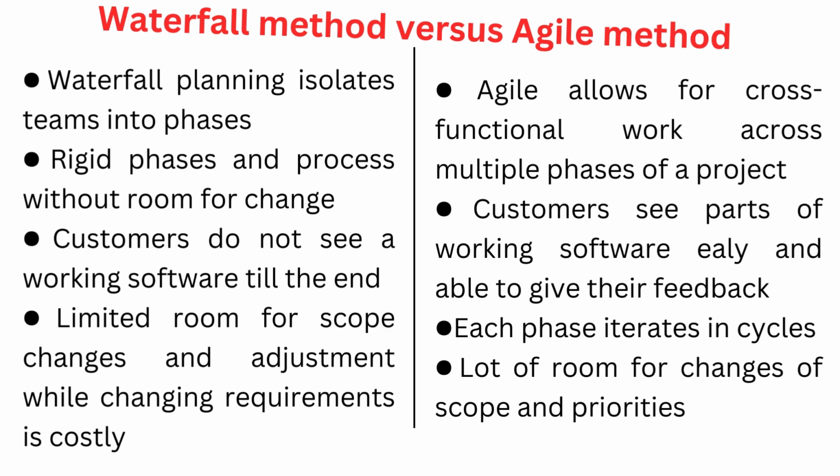Agile, on the other hand, allows a lot of room for changes at the end of each iteration. Since requirements are not completely analyzed and the whole system is not built in one go, customers can constantly review the work in releases after each sprint, give their feedback, and request changes to scope or improvements to already built parts, and these scope changes are accommodated at zero or low cost, since they are related to a part that is not already built.